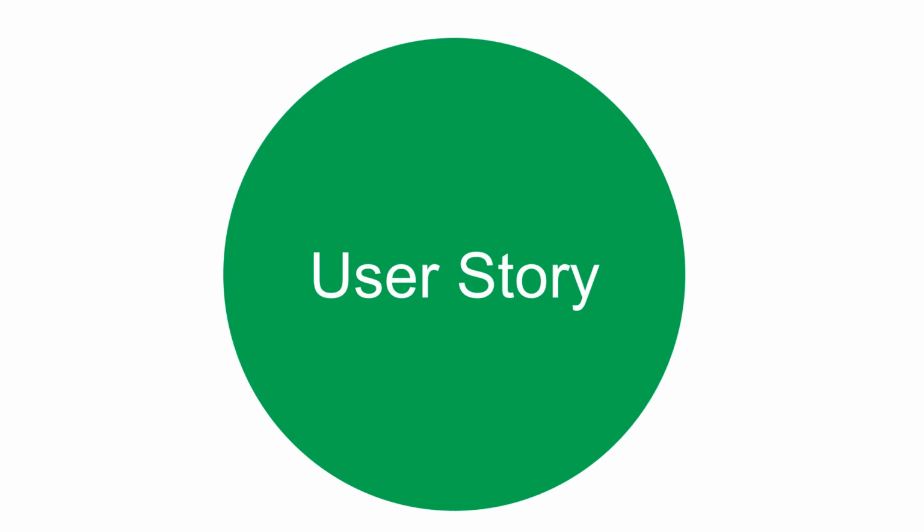Here are some useful strategies to split Agile user stories. Workflow split. Does the story describe a workflow? Operations split. Does the story include multiple operations, such as configuring or managing something? Business rule variations. Does the story have a variety of business rules? Variation in data. Does the story do the same thing to different data?